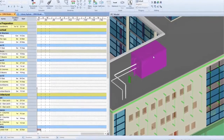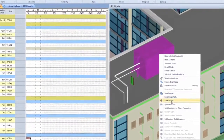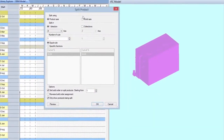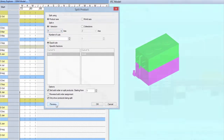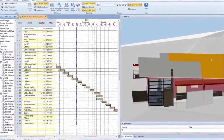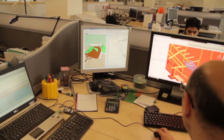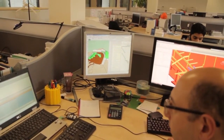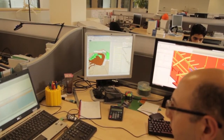You can separate IFC elements to reflect the way it would actually be built. You can split multiple times in 3 axes and merge items, and assign build sequence to subsections for accurate planning.